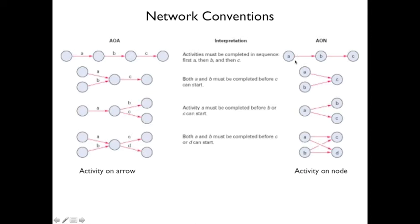In these network diagrams: A must be done before B, which must be done before C. Or A and B both have to be done before you can start C. Or you have to do A before you can start both B and C. A more complex example: you have to do A and B before you can start both C and D. Those are different networking conventions.